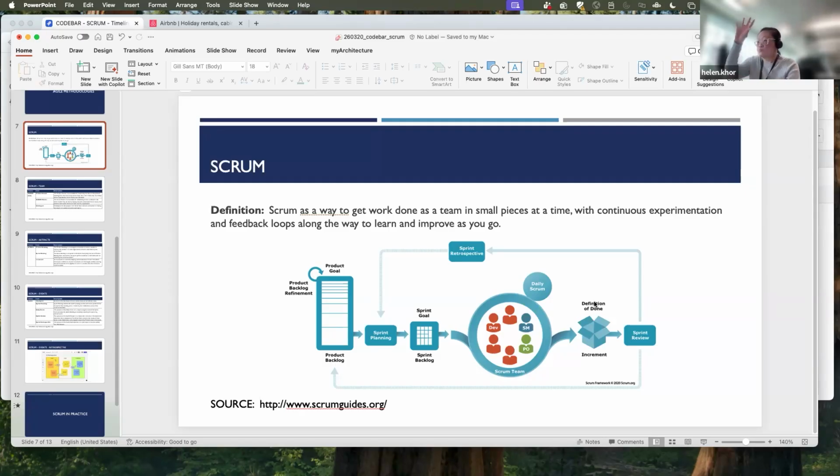So once that sprint is nearly complete, and let's say it's 2 weeks, often you would have a Thursday session where we do sprint reviews. So it's like a demo session. The demo session could be with the client or without the client. It really depends. It's not quite straightforward, but we would each provide a demo of what we have completed for this sprint. And often, we'll share our screen, show off the function, tell them what ticket you worked on and what the result of that is.